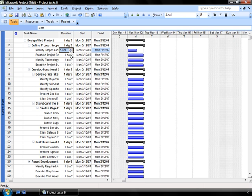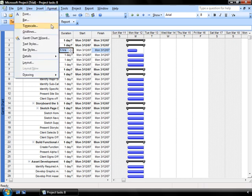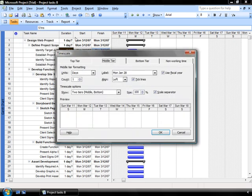So again, to recap, to change your timescale, you'll go up to Format, you'll go to Timescale, and you'll determine and modify the middle tier and bottom tier to get the viewpoint of the project that you want to work with.